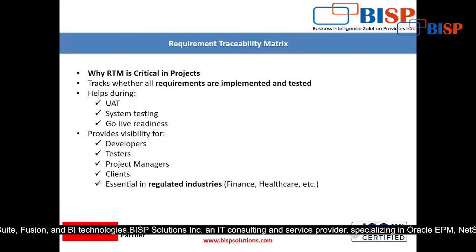But if you don't share this RTM document with the client, then what happens is that after the completion of that particular module scripting, if the client raises any objection, you don't have any choice, you have to follow him. Again the time and the efforts will be used, right? So that is why this is essential.